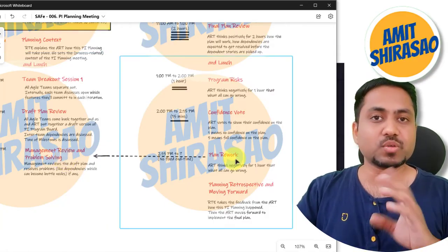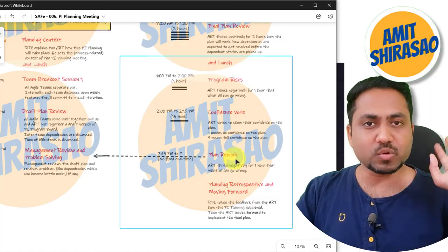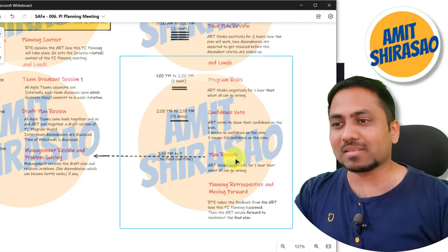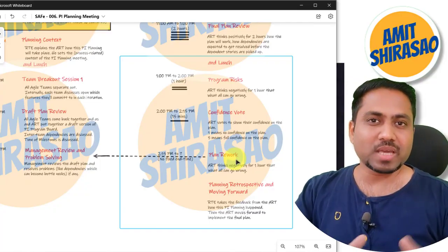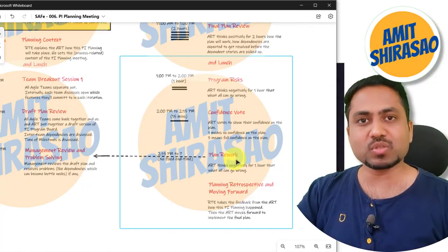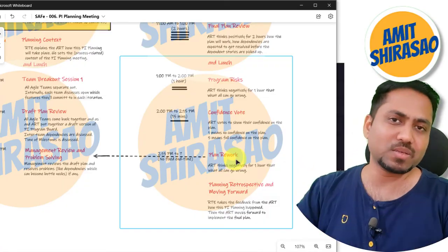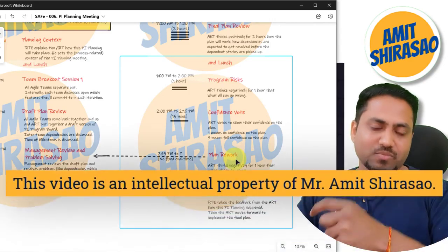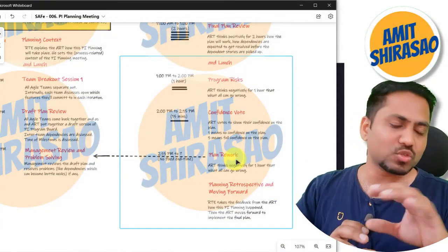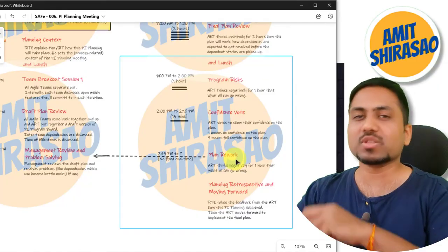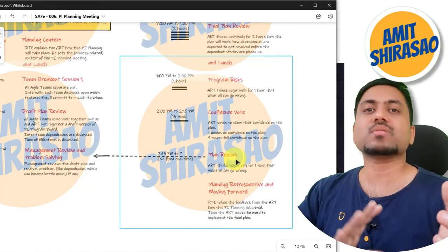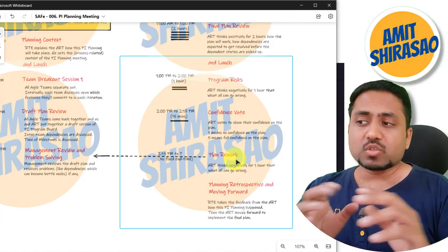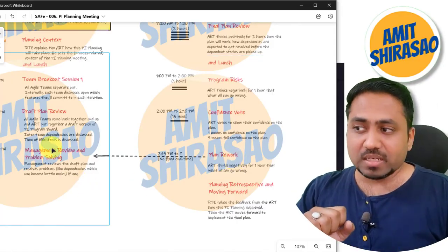This time we don't say that everybody else can go home. No, nothing like that. You stay there, you all plan together, and some problem solving happens. This doesn't take very long, because normally there are 2-3 things that people are skeptical about, and if those stories are front loaded in the earlier iterations, then most people are happy. How to do that? Mostly it is by borrowing of resources, which is not a very good practice, but that does happen, and it is easy to solve.